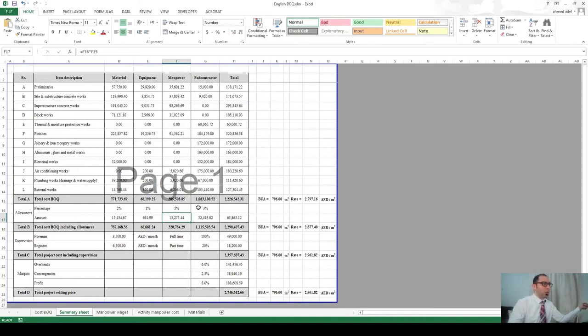For subcontractors, for example, to whatever cost I arrive at based on the subcontractor quotations, I am adding 3%, or allowing for 3% more, for any services that will be required from me as a main contractor to help the subcontractors execute or continue their job. Guys, that's why it is called cost estimation. I am not calculating anything here. I am estimating.